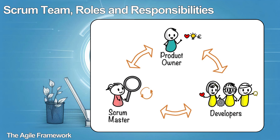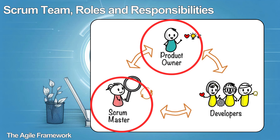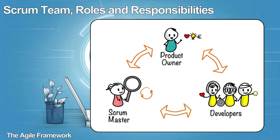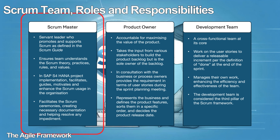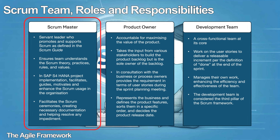Scrum teams are generally self-organizing and cross-functional. A Scrum team consists of a product owner, a Scrum master, and the development team. In a Scrum team, there is no hierarchy. There can be multiple Scrum teams and a Scrum of Scrums in one SAP S/4HANA implementation. The Scrum master is a servant leader who promotes and supports Scrum as defined in the Scrum guide. For the internal members of the team, the Scrum master ensures that they all understand the Scrum theory, practices, rules, and values. Additionally, the Scrum master helps members of the organization who aren't part of the Scrum team by guiding their interactions with the Scrum team.